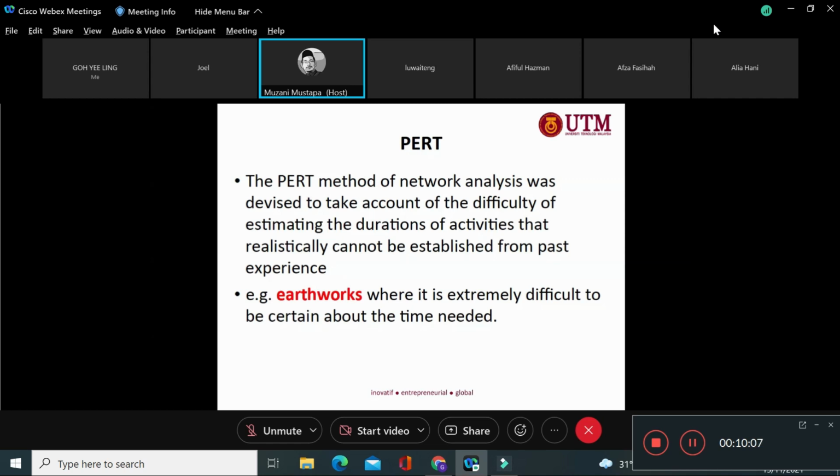So you have to stop construction, stop digging, and do extra work such as dewatering. You need a pump, then dry the soil and do soil stabilization. After that, you do the concreting work, such as pile caps or footings and so on.